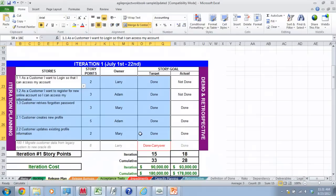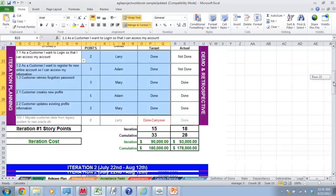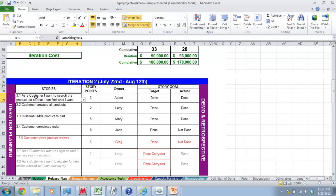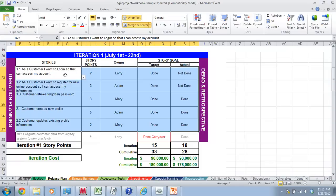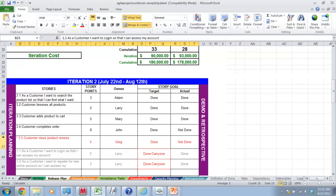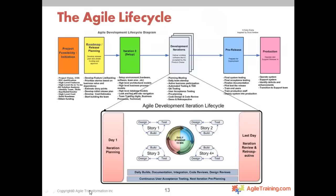Pre-planning means that while iteration one is being executed, a subset of the team — typically the product owner, analyst, and a few others — are already writing detailed requirements for the stories planned in the next iteration. That way, when you come to the next planning meeting, everyone already knows what needs to get accomplished. Without this, you end up churning in the next iteration. It's a best practice we strongly recommend.